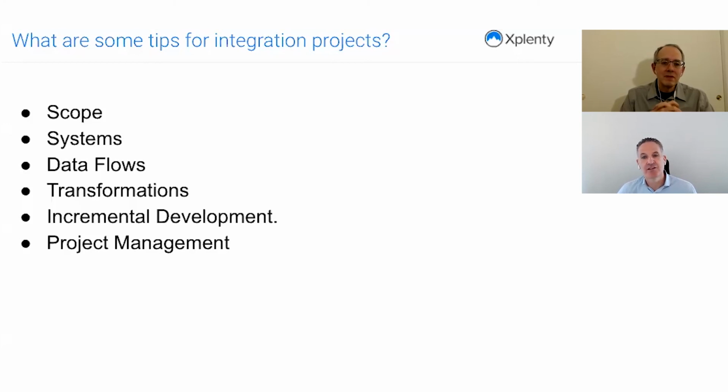And then look at the tech as well. When you're doing the scope, really look at what you need the tech to do, almost like what are the technical requirements. So how fast you need the data to be integrated. What sort of data volume are you going to pass between different systems? Because that can make a significant difference to the solution you pick, and the size of the scope.